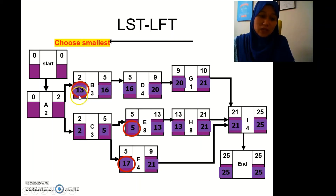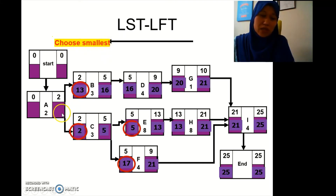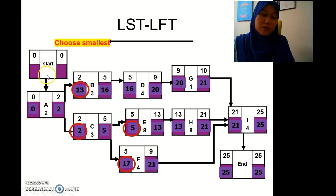Again we need to make a decision — going backward, choose the smallest. So 2 minus 2 is 0. Then 0, and at the start box 0 plus 0 is 0. We have completed the network diagram.